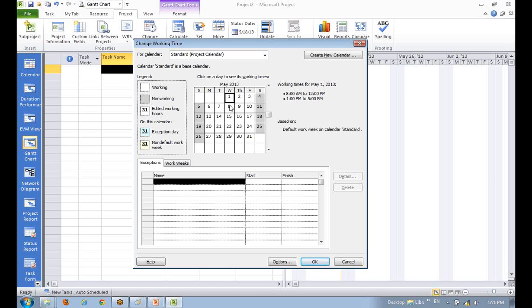You click on May 1st and say it is Labor Day, or May Day, anything. So this is marked as holiday. The other days are 8 to 12, 1 to 5, while the first is a non-working day.